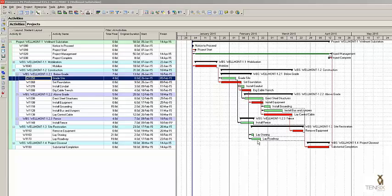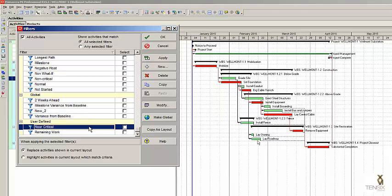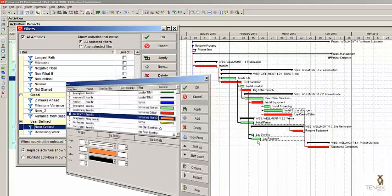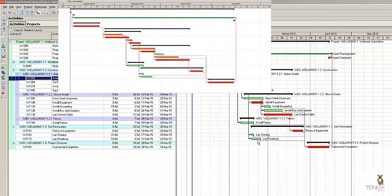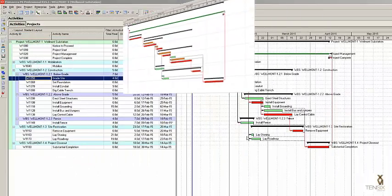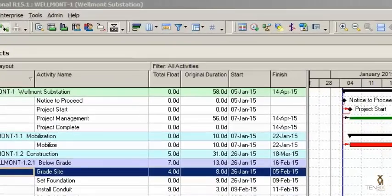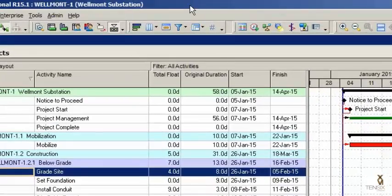This video clip demonstrates how to create a filter and corresponding bar chart so you can easily view near critical activities on the Gantt chart. The first step in the process of creating a near critical bar is to create a near critical filter. To get to the filter dialog, click the filter icon in the layout tool group at the top of the screen.